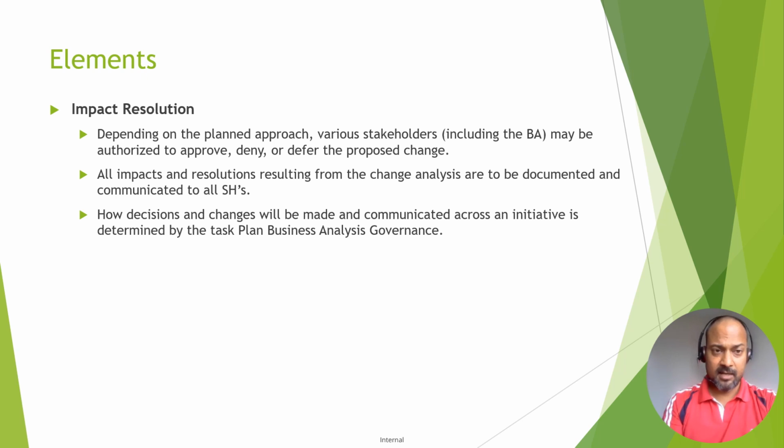And then finally, the impact resolution. Depending on the planned approaches, whether we are going adaptive or predictive, or depending upon the various stakeholders that include the business analyst, may be authorized to approve, deny, or defer the proposed changes. All impacts and resolutions resulting from the change analysis are to be documented and communicated to all the stakeholders. How decisions and changes will be made and communicated across an initiative is determined by the plan business analysis governance approach, right?